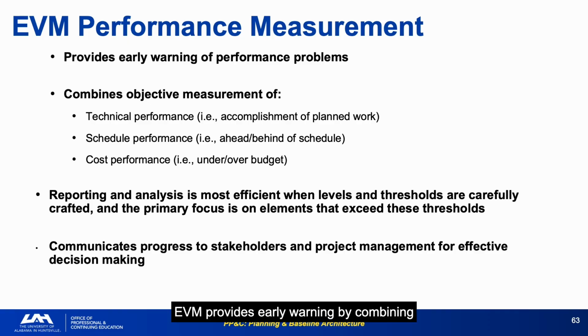EVM provides early warning by combining objective measurement of technical accomplishment, schedule performance, and cost performance into an integrated picture of project health. Reporting and analysis is most efficient when levels and thresholds are carefully crafted. This is the analyst's setup instruction. Thresholds should be set based on the program's size and risk profile, not copied from another program without thought. Communicates progress to stakeholders and project management for effective decision-making is the outcome statement. EVM data that doesn't flow into decisions has failed its purpose. It is generating reports, not producing insight.